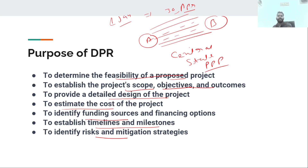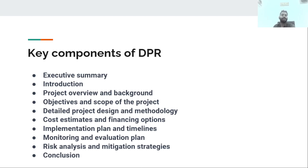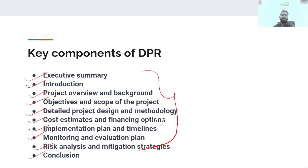What are the key components of DPR? First, the executive summary. Second, the introduction of the project — its overview and background. Third, the objectives and scope of the project. Fourth, the detailed project design methodology. Fifth, cost estimates and financing options. Sixth, the implementation plan and timelines. Seventh, the monitoring and evaluation plan. Eighth, risk analysis and mitigation strategies, and conclusions. All these points make up the detailed project report.